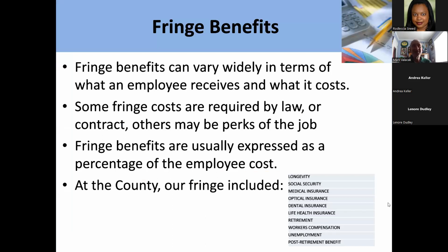Now, another area that's going to vary greatly based upon your particular agency, and even within an agency. So for example, at the county, we had different bargaining units that may have had different fringe benefit packages. So typically you'll determine what the fringe benefit costs are for your personnel and use a factor to associate with that cost.